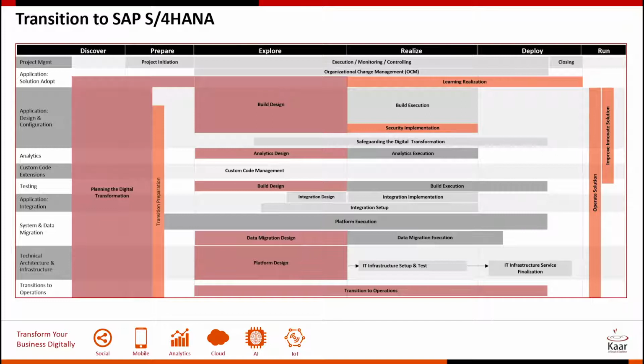Given the importance of this phase, we also recommend that you run certain pre-checks on a copy of production in your sandbox, and this will help you zero in on a more realistic timeline and resources required from the business and the IT during the conversion. Because the S4 conversion is a completely data-driven, functional-driven project, the more bottlenecks and hurdles that you remove upfront, the smoother the journey will be.